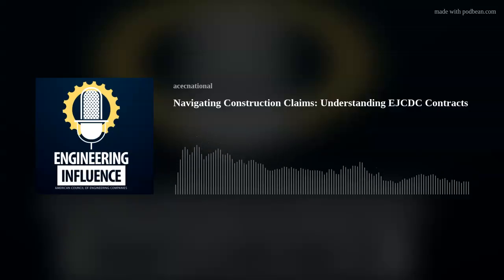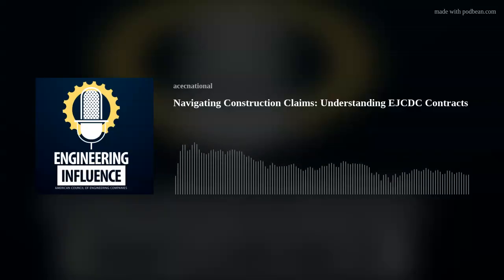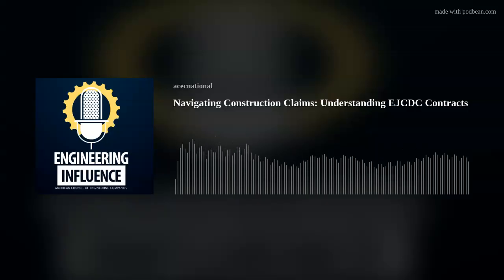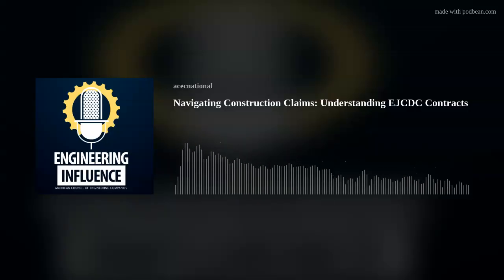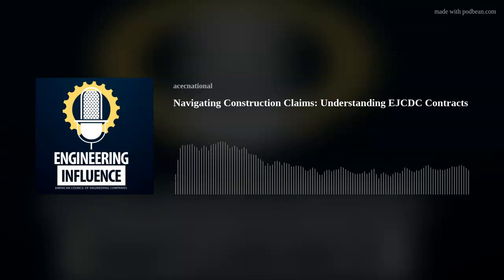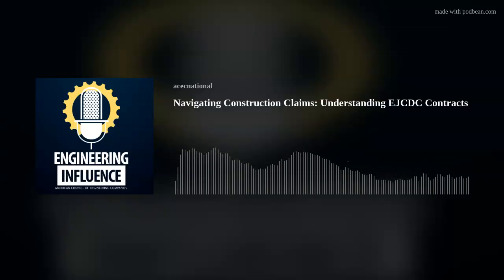Yeah, absolutely. And doing appropriate due diligence investigations of physical conditions, if nothing else, going out to the site during design, as EJCDC has long liked to say, at least in our guidance materials, with your head up and your eyes open, to take a critical look around during design at what's really there, with an idea of, does this really differ from what's on the old record drawings of this existing facility? These are ways to help reduce the potential for differing site condition claims, but there's probably no amount of diligence which is going to forestall them in all circumstances.